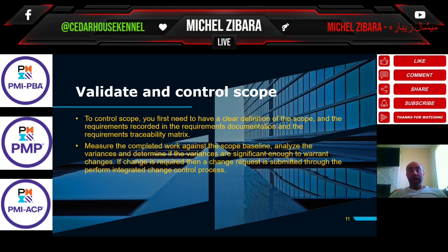If not, then if it's a critical change which will affect the project and could result in a project failure, then that change should be evaluated. Again, back to the business case, make sure it still ties in with the business objectives and with the company strategy, and make sure that the change control board authorizes the change. There are some changes the project manager can execute without referring to the change control board, depending on what he has from authority and plans in his hand.